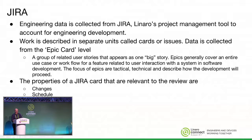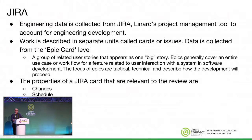The ERB is concerned at the epic level, which is the tactical level — the level at which work is being done and explained in a technical way. We're looking for any changes in definition, scope changes, or schedule changes. We need to know dependencies — if a piece of work depends on another and that secondary work isn't progressing, especially if it's owned by another team, there needs to be communication to get aligned. And finally, blockages — if it's an external blockage, we have to know about it and figure out how to mitigate it.